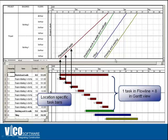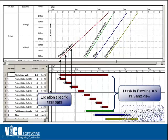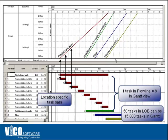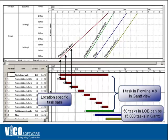The continuity of locations is ensured by having a continuous line without any break in the line, and the logic is automatically handled by the program. So you only need to take care of predecessor and successor activities, which reduces the number of links by an order of magnitude and helps you manipulate and resequence the schedule as many times as you need to during the pre-construction process.